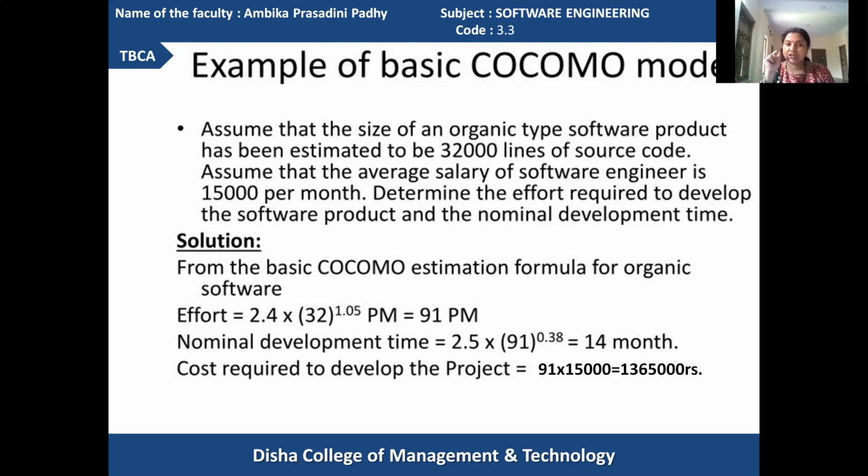Look at the expressions, formulas. If you apply the formula, B1 into effort to the power B2, it is 2.5 into 91 to the power 0.38.